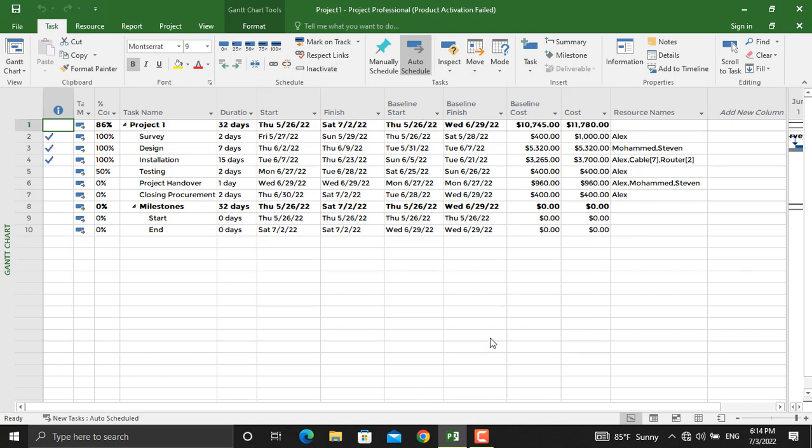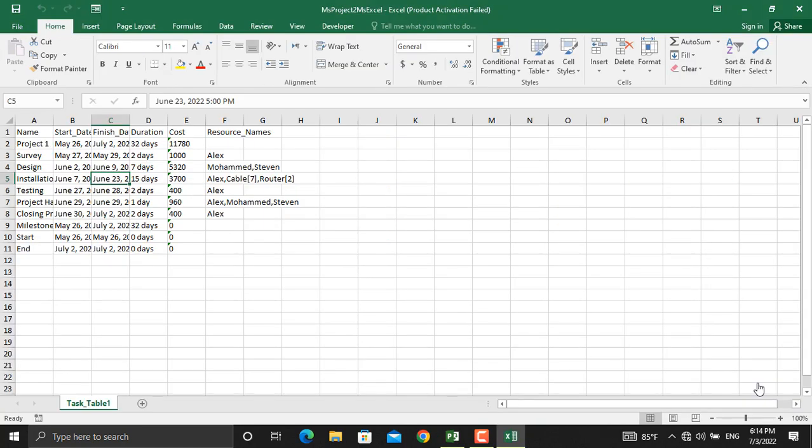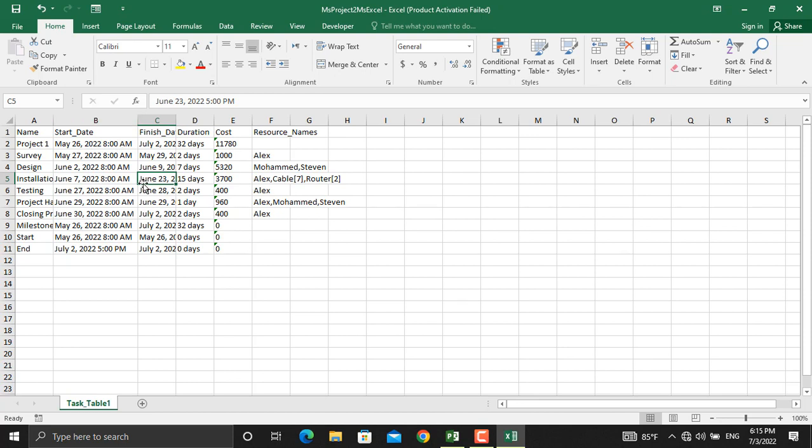So this is the file that's created in Microsoft Excel. Earlier I told you that all the information will be exported as text. For example, if you see this date it will be text. If you're going to do further calculations using Microsoft Excel it cannot be done, so first you have to change it to date.